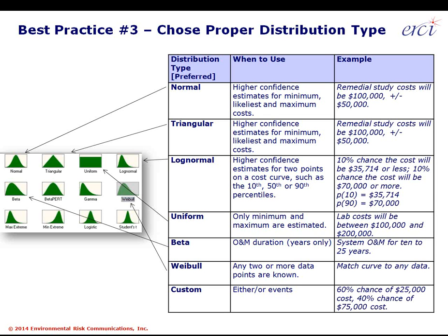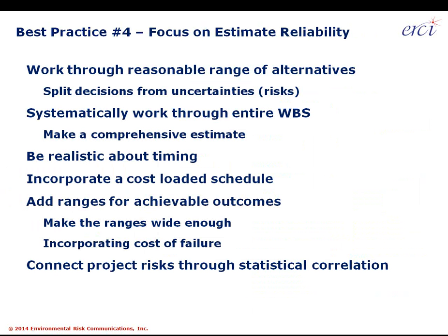They don't act that way. An experience scattergram would show that environmental costs don't behave in accordance with those 4 distribution types. They instead behave like beta, Weibull, beta PERT, and other more complex distributions, which in turn take more thinking. But I'll go over each of these in a little more detail further on in the presentation.